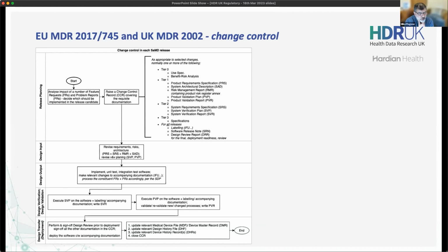So going back to the previous question about CI/CD, continuous integration, continuous delivery, why I said there's got to be a bit of ritual here is there needs to be consideration at every change. So every change we say logically consists of a number of feature requests. So people want new things or changes to things, or problem reports. Something has a bug in it and you want to change it as a result of something existing having a bug, not just wanting to change it because we've learned something new, perhaps.